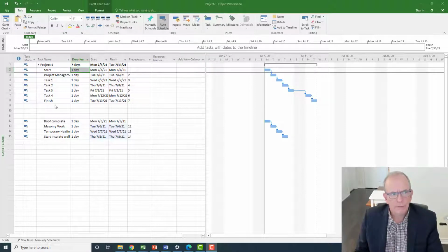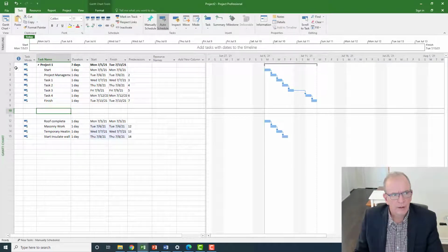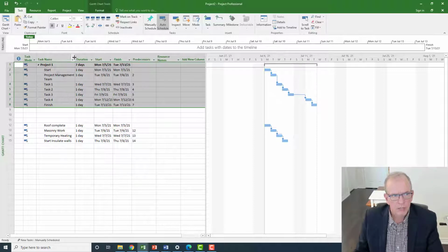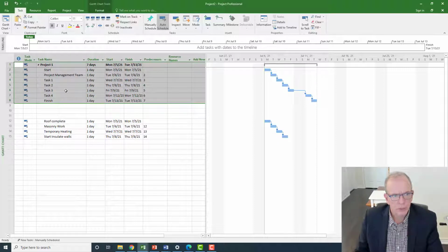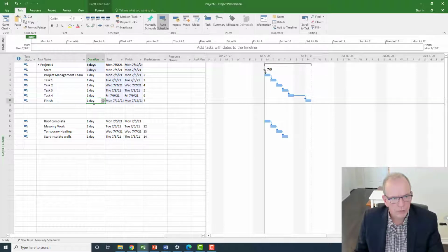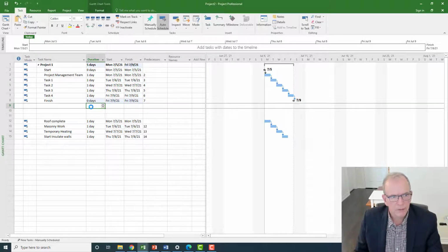So I've created a few activities here. I'm going to start with this grouping here. And if you want, you can just freeze it and follow along, type it in yourself, or you can just watch what I'm about to do and get a good sense for how this works. So I've created a project summary task, and I'm going to make this a milestone because one of the best ways of setting up a hammock activity is to start with a milestone and finish with a milestone.